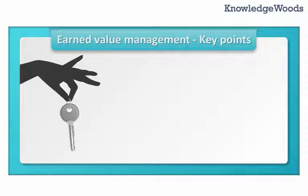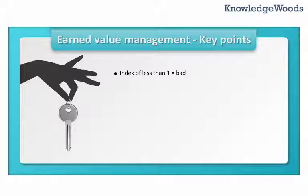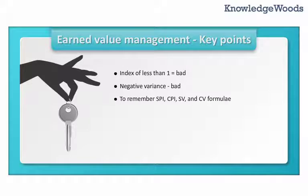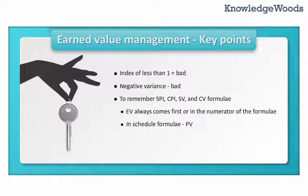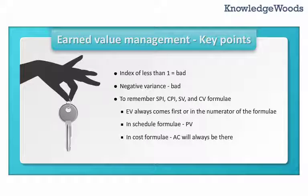Earned Value Management key points: An index of less than 1 is always bad. A negative variance is bad too. Tricks to remember SPI, CPI, SV, and CV formulae: Earned Value always comes first or is in the numerator. In the schedule formulae, Planned Value is the other component. In the cost formulae, Actual Cost is the other component apart from Earned Value.